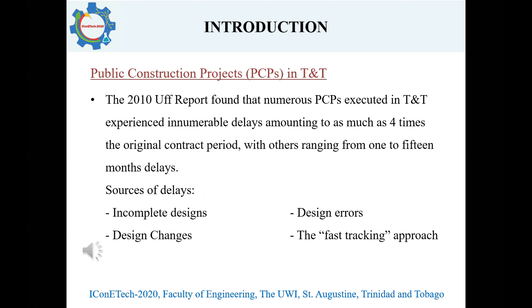Public construction projects in Trinidad and Tobago have experienced significant schedule overrun, and as a result, in 2010, the government of Trinidad and Tobago mandated a commission to inquire into particular aspects of the construction sector. This commission of inquiry is commonly referred to as the 2010 Off Report, which found that public construction projects suffered delays amounting to as much as four times the original contract period, with others ranging from one to 15 months.